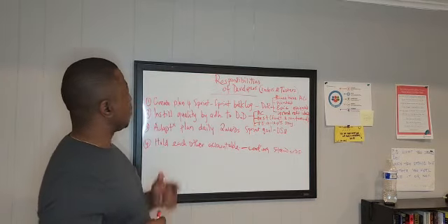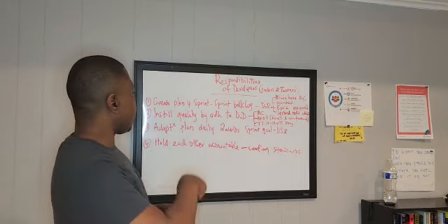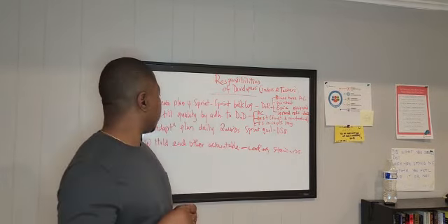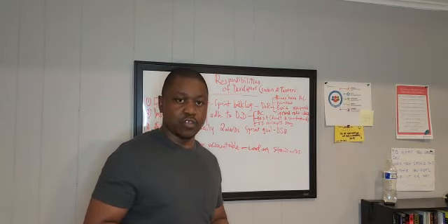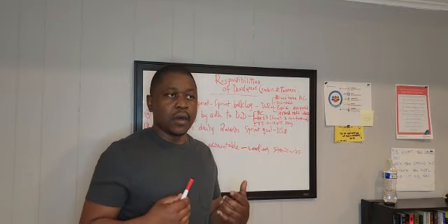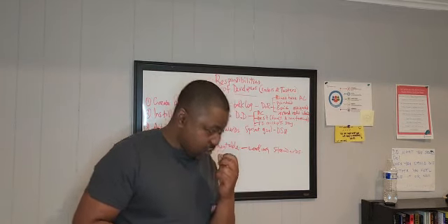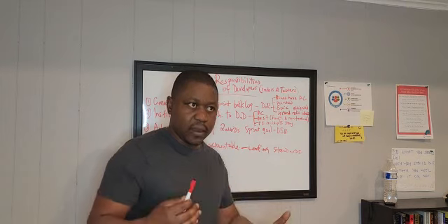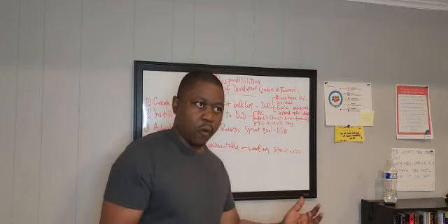Another responsibility of the developers is to adapt the plan daily towards the sprint goal. On a daily basis, they meet during the daily stand-ups and have conversations on their progress towards the sprint goal. If there are any changes coming, or if they're having challenges like impediments, since they are cross-functional and self-managed, they work together to resolve all those impediments.